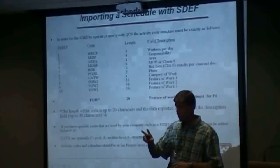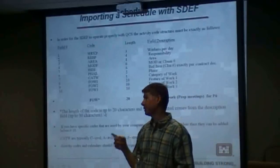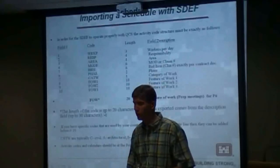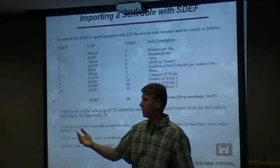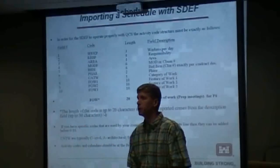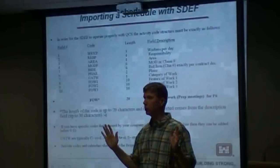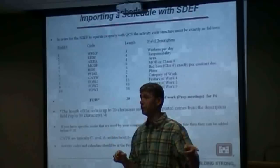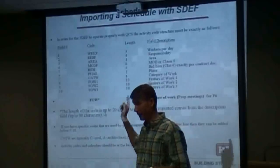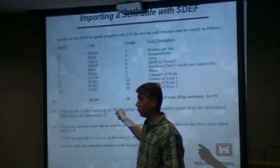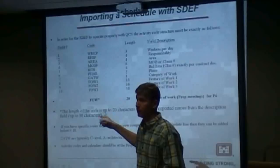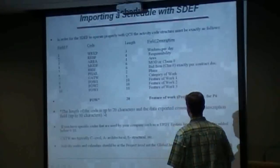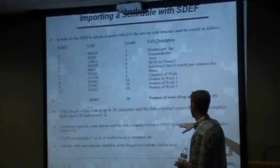The second item: your plans have to be balanced and in sync every single time. So if we give you a modification — a notice to proceed on a price change order for, say, another $30,000 — you may not be in agreement with us on cost yet. But if we give you a notice to proceed, you're going to have to put an activity in your schedule for that $30,000, or it won't import and you won't get paid this month. The schedule is very dynamic and we expect it to be kept up to date.